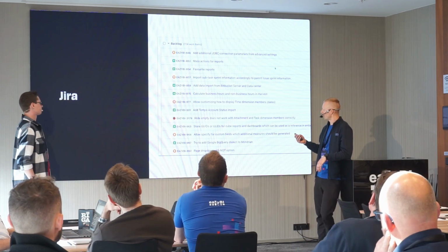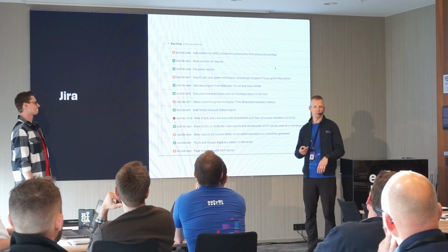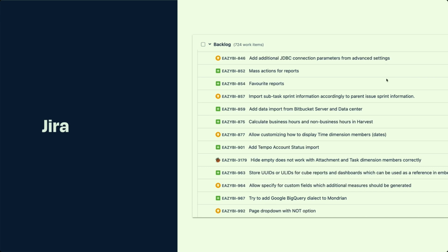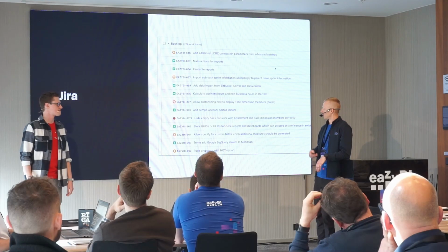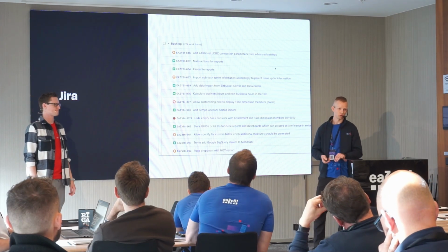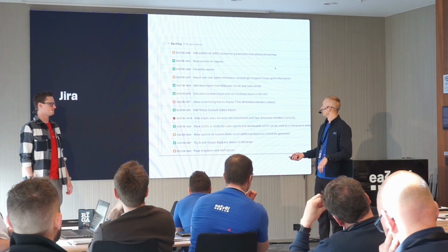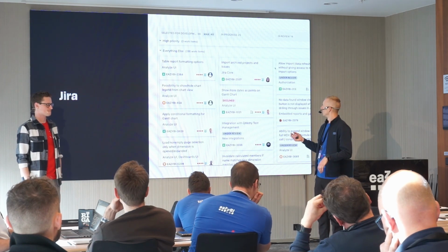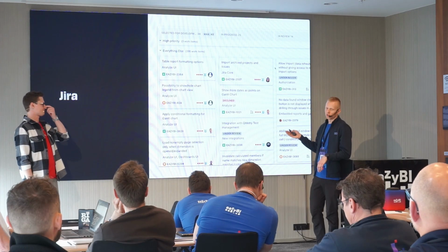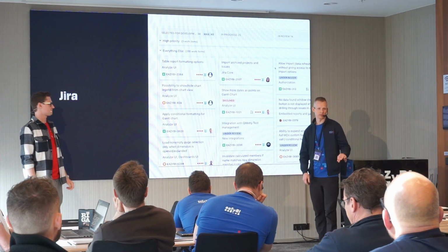But each time when you send us something, some of our colleagues go through it in detail and check maybe to add a vote to an existing task, maybe to report a new one, or maybe even suggest an existing solution to you and not create any task. And of course, then we use our board with a selected for development list, which is mainly the part where each developer picks the task, what to do next.